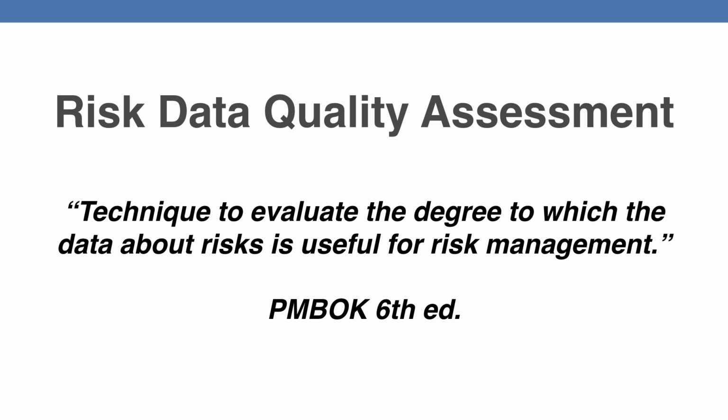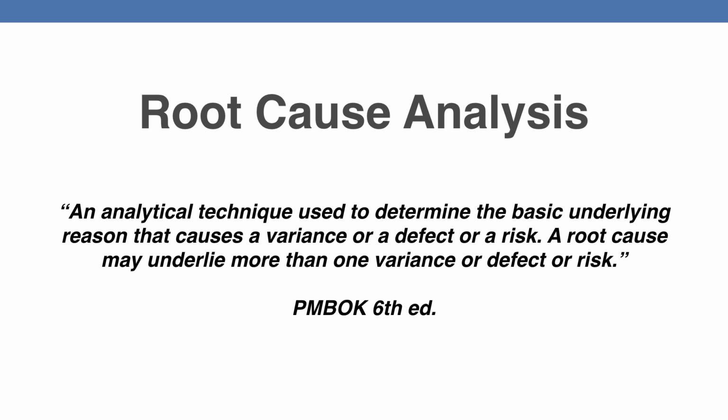Risk data quality assessment is a technique to evaluate the degree to which the data about the risk is useful for risk management. Root cause analysis is sometimes also called the fishbone analysis. Essentially, you have the problem at the head of the fishbone, and then you will draw multiple quote-unquote bones or lines representing the different causes of the problem, and you will systematically eliminate each of the lines or bones in order to find out what is the root cause of the problem.